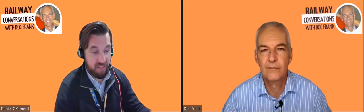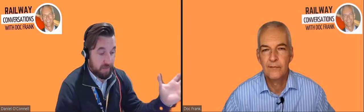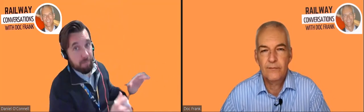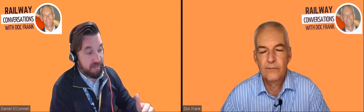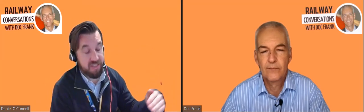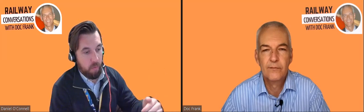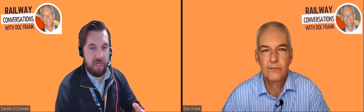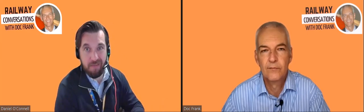And you validate these systems again at slow speed. You then start stepping up into what we call your functional testing. And to me, that's predominantly the settling slow speed test. So start a mission. What happens when we implement a temporary, let's say a TSR? If we want to prove route proving, so point to point to point. And then at that point, you'll get to a maturity level when you can start testing settling protection.